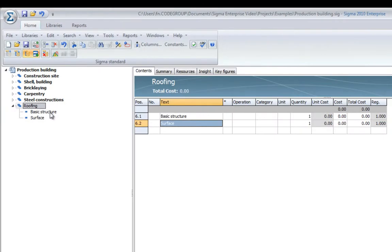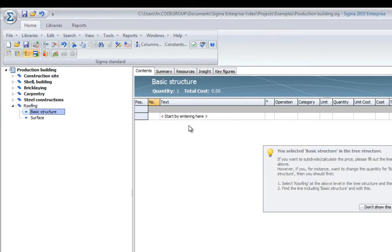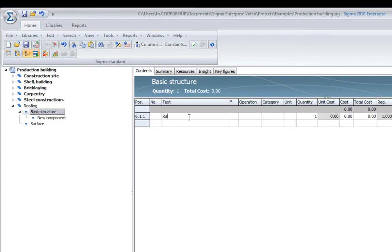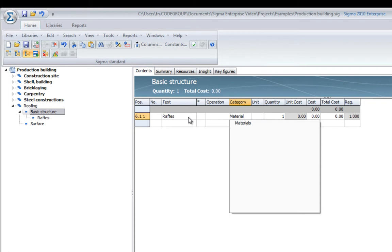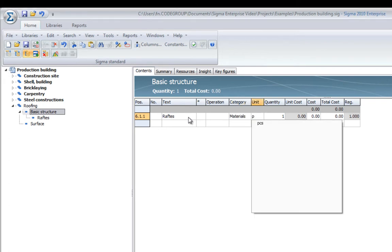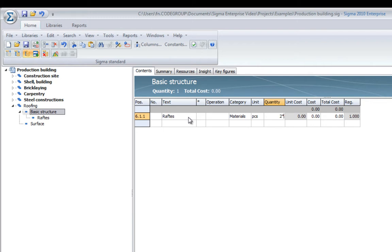I will now point to the basic structure and start adding rafters. Say this is a material. I will count it in pieces. I have got 2 buildings times 20 pieces at a cost of 500 per piece.